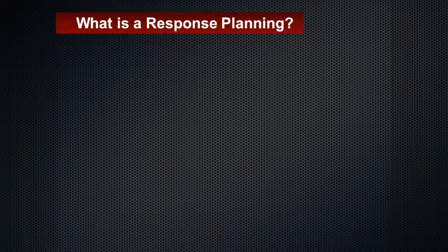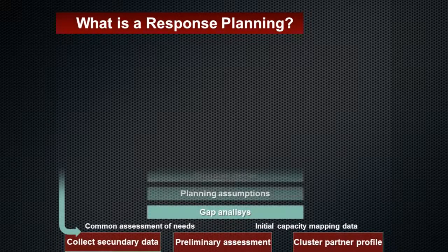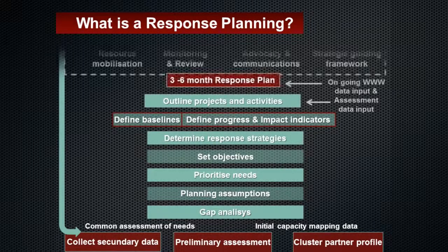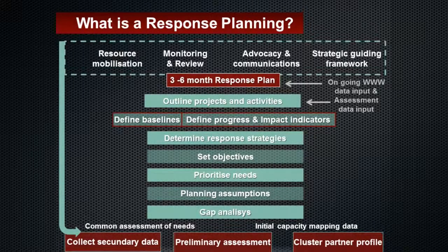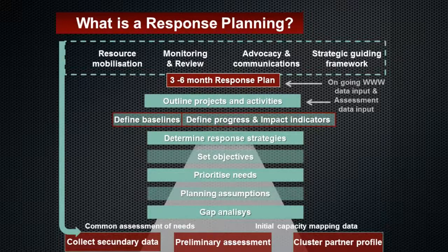The response planning is a process that includes the following steps. Have a careful look at the various steps that we shall need to take when establishing a response plan. Response planning is a process that takes us from the preliminary assessment to the gap analysis. After making some assumptions on the planning and based on the priority needs identified during the needs assessment, we shall be able to set clear objectives of the response and to define response strategies. Based on the agreed indicators of the response plan, we shall be able to outline the project activities.